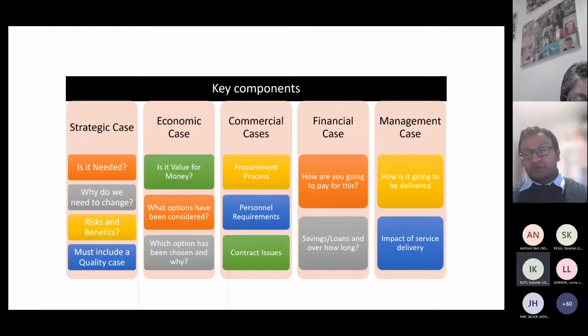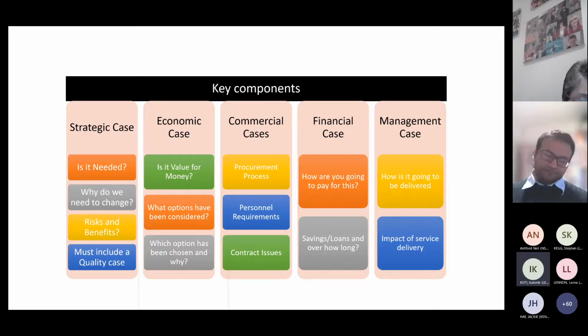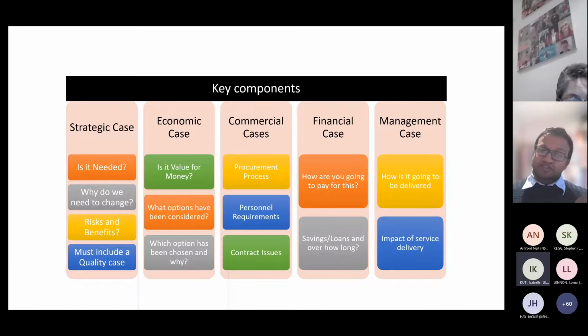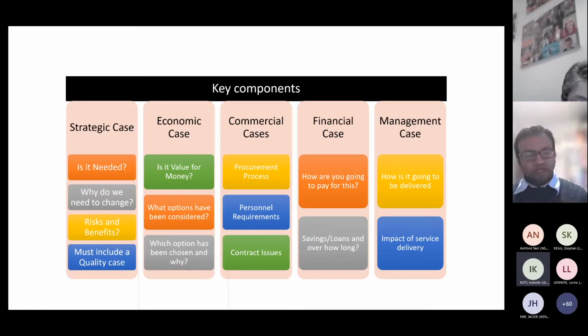Also, when you're working out how much things cost, you have to use something called the life cycle cost, or the whole cycle cost. Some companies, particularly when you're procuring equipment, will give you stuff free, and you have consumables which you pay for. Other places, you have to pay up front, but the consumables will be cheaper overall. And your projected usage will determine which one will be the most cost effective, or which one will cost the least amount.